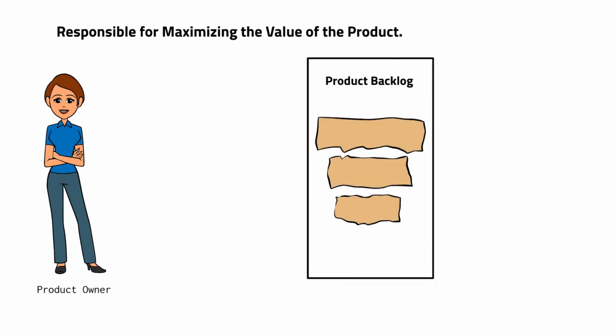Including new requests in the product backlog, changing the order of importance is only possible with the approval of the product owner. It is a conscious decision for the product owner to be a single person. Ultimately, the only person responsible for the product is the product owner.